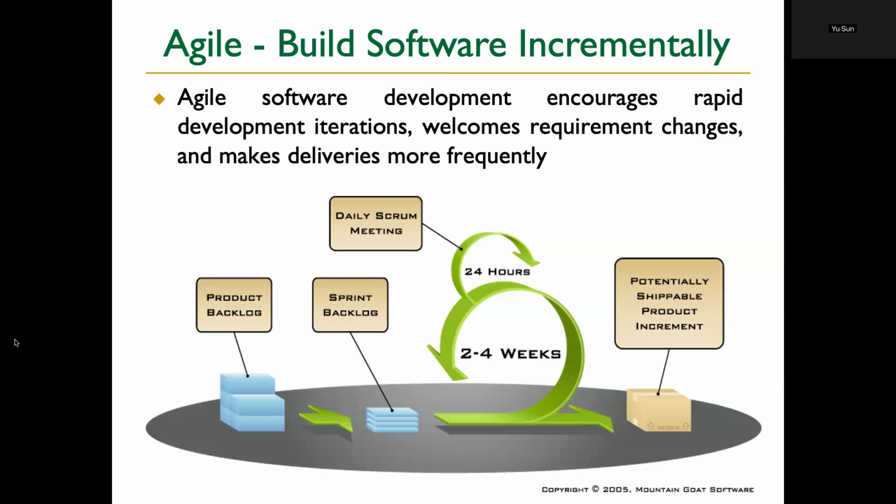To summarize, Agile development is very similar to the waterfall model. But we just want you to break the big development cycle, all the time you have, into smaller ones. So every cycle, you do the complete process. But in order to do that, you cannot finish all the work. So what we ask you to do is put everything you have to finish into what we call a backlog. All the features, all the changes, a long list.